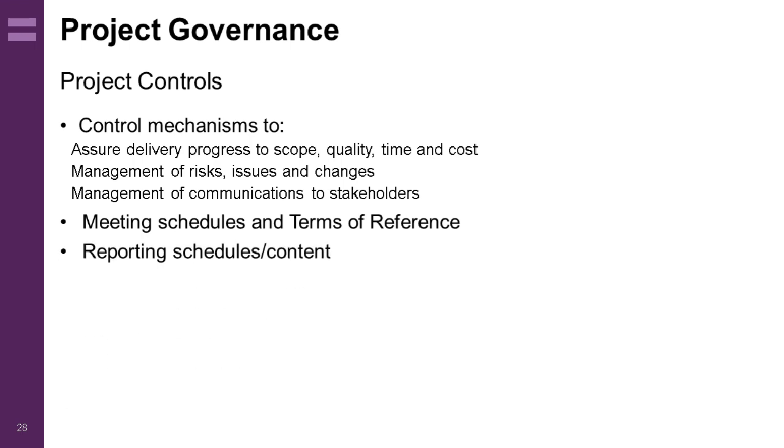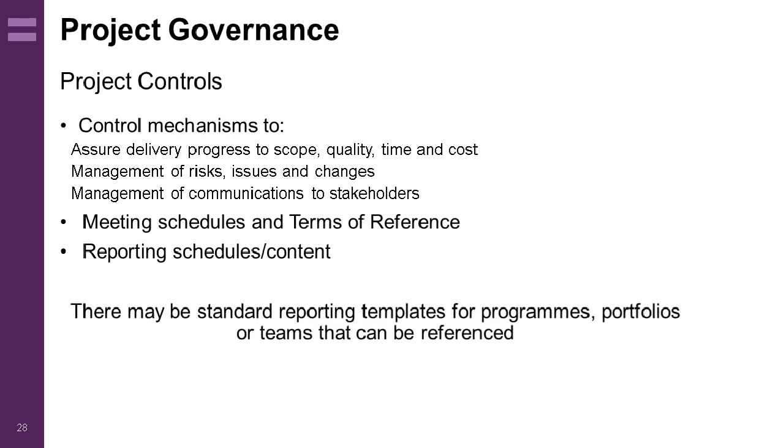Reporting is usually by way of highlight, exception and checkpoint reports, and so the content and frequency would be specified here. This is another area where there may be corporate policies or departmental standards that can be referenced. It's also possible to reference the PID of a portfolio or program that encompasses the project where these may already be set out.